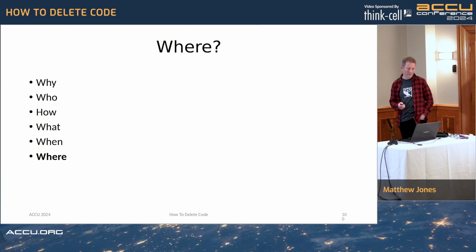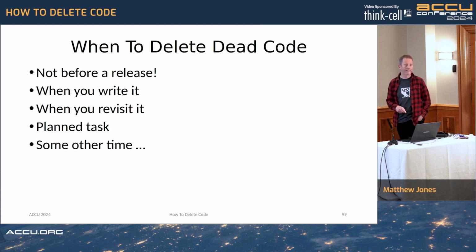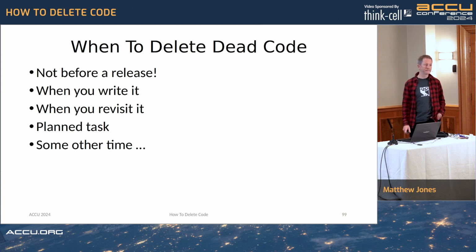Yes, Roger. It's also seasonal. My current team, we keep some of the dead code deletion and other sorts of refactors until the Christmas New Year period, when only a few of the team are in, so there's much less code churn because only a couple of people are actually working on the code base. That's a great time to do refactoring like that, because you can delete it and there's nothing else changing. And similarly, over the summer, when a lot of people are away on holiday.